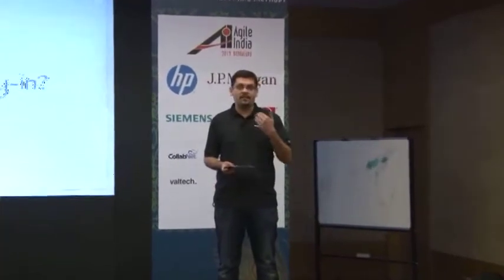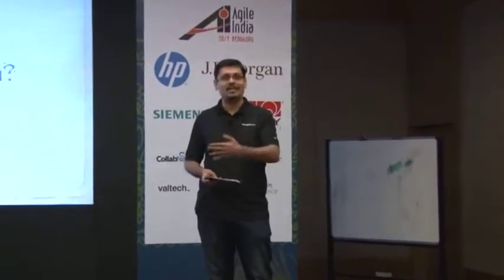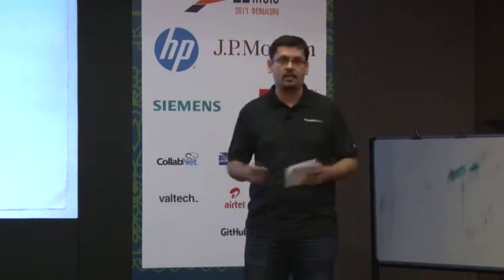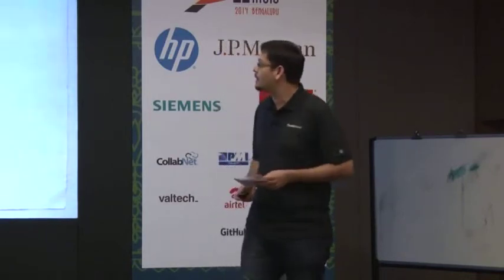Because if the default model is to have on-site proxies for an offshore team, then again, that's a model that we find can very easily fail. It's a riskier model. We would much rather have all the key stakeholders directly having conversations with our development teams, sitting wherever they are, whether they are sitting in Brazil or India or anywhere else.